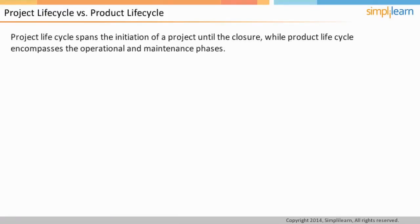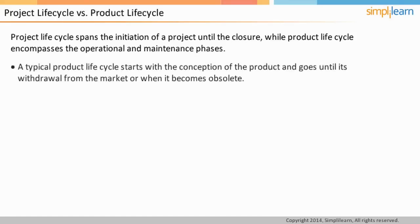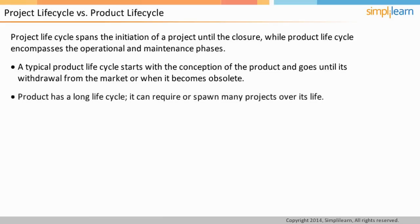Project lifecycle spans the initiation of a project until the closure of the project. The product lifecycle, on the other hand, also encompasses the operational and maintenance phases. A typical product lifecycle starts with conception of the product and goes until its withdrawal from the market. The withdrawal might be because it becomes obsolete or there is no further need for the product in the market. A product has a long lifecycle and can require or spawn many projects over its life.